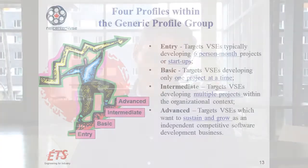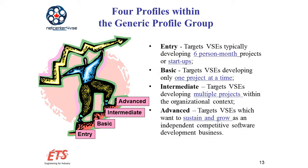We have developed four profiles. The first profile is called the entry profile and it is targeted at VSEs that are in start-up mode or for VSEs that have very small projects of six person-months or less. The second profile is the basic profile for VSEs developing one project at a time. The intermediate profile is targeted at VSEs developing more than one project at a time. And the advanced profile is targeted at VSEs to help them sustain, grow, and manage their portfolio of projects.